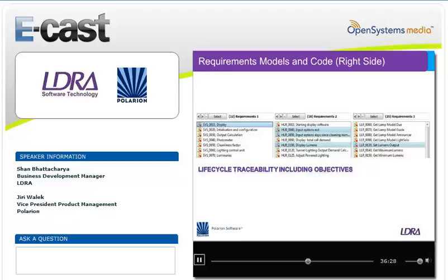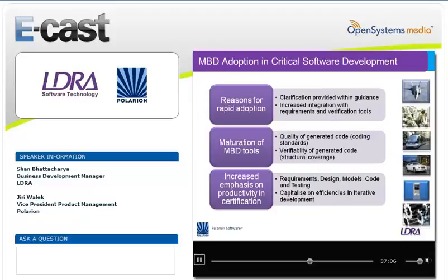You may be in negotiations with a program manager and they want to move some UI piece from one part of the vehicle to another, and then you're quickly able to hone in on the system level requirements that are affected and see all the way down to the code and see what it affects, even the testing, and do a rapid impact analysis and be in a lot better negotiation position, for instance. So these benefits that come with traceability and transparency are not always clear up front. But once you get used to taking advantage of all of that data and keeping up all that data, they can be extremely useful at lots of stages in the life cycle.